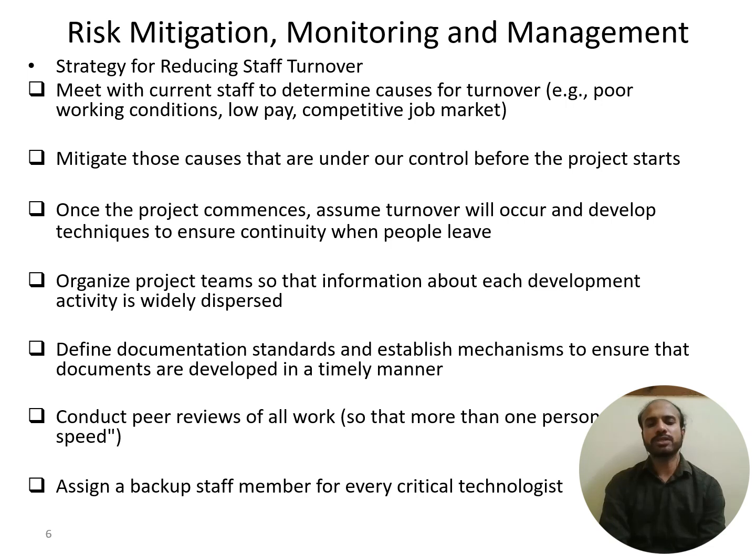Organize the project team so that information about each development activity is widely dispersed. Define documentation standards and establish mechanisms to ensure that documents are developed in a timely manner. Conduct peer reviews of all work. Assign a backup staff member for every critical technology. So these are some of the strategies that you can follow in order to mitigate that particular risk of staff turnover.